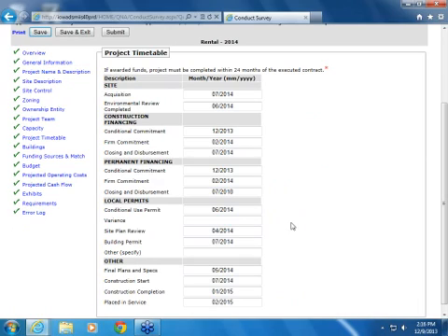The note I did want to tell you earlier, the one I forgot about: when you have a contract to purchase a property, make sure that you take into account the timeline that we're looking at. These applications will not be awarded funds until April. So your contract to purchase has to go past the date that you have clearance on environmental review. If we're making awards in April, sometimes your environmental review is 3 to 4 months. So you may need to look at the summer for your contract to purchase to have an effective date through that period of time.